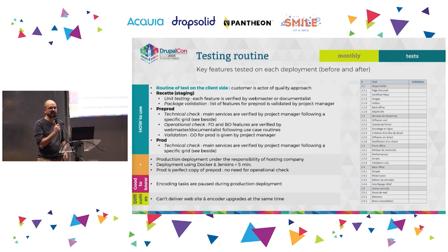If my technical check is okay, then my colleagues start the operational check, to verify that each use case of Can Lille is working well, both for front and back office. For example, the documentalist verifies the results of the search engine for specific keywords and checks that the results conform to the data. Also, the webmaster verifies the whole process of creating, modifying, and deleting media content. For that, they also use their own routines and grids, and this process takes about 30 minutes.